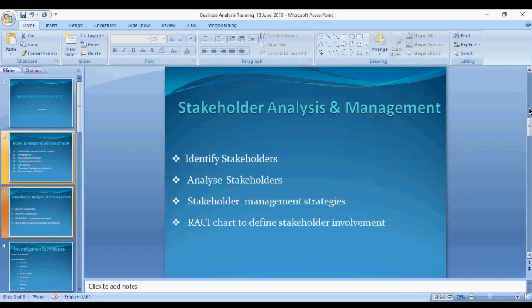Once you have your project manager, you contact them and ask various questions about the SMEs, the people that you need to speak with. Then you'll be able to know the contacts. This stakeholder analysis needs to be carried out during the project inception. Once they kick off the project, that's when you start your identification, because without knowing your stakeholders, you cannot gather the requirements.